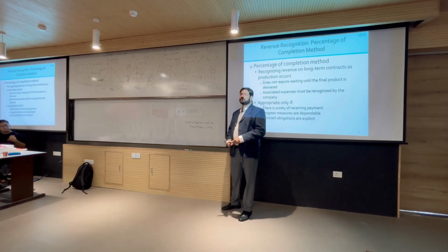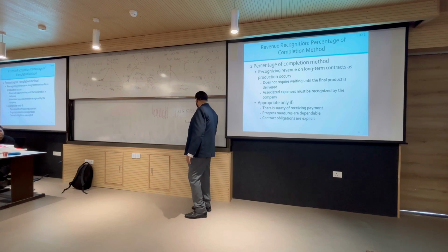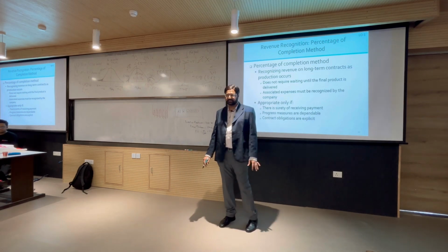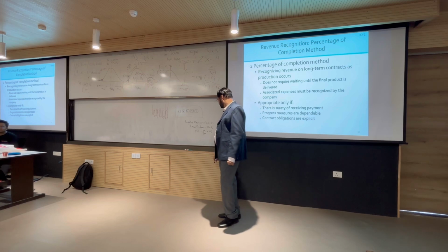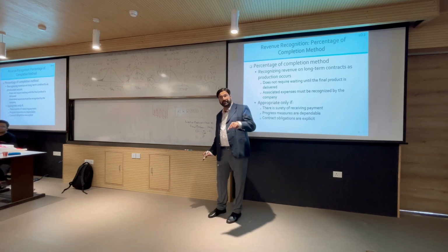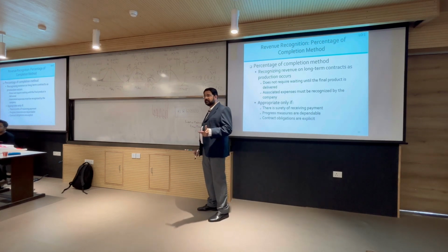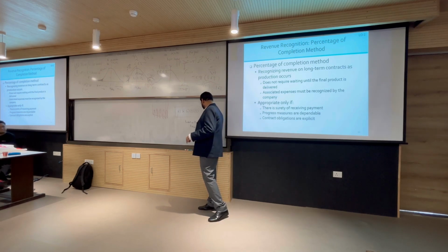So, what is the percentage of completion? 25%. So, POC or percentage of completion is 500 by 2000 equal to 25%. Next month, I have spent 300 man hours on the project. So, next month's POC is how much? 800, 500 plus 300. In this month, I only spent 300, but the total POC is how much? 500 of previous month plus 300 of this month. So, 500 plus 300, 800 by 2000. So, it is 40%.